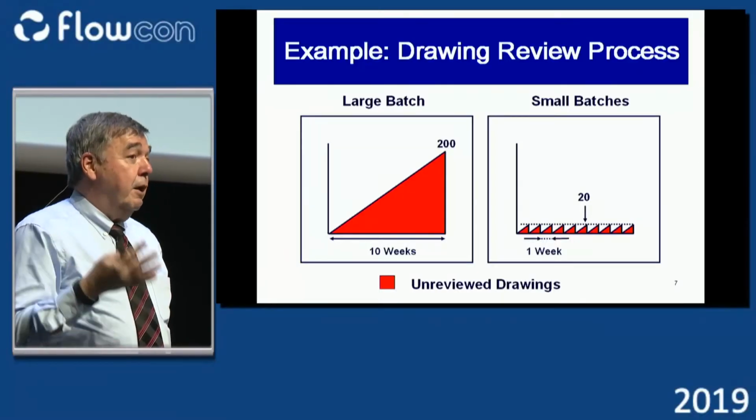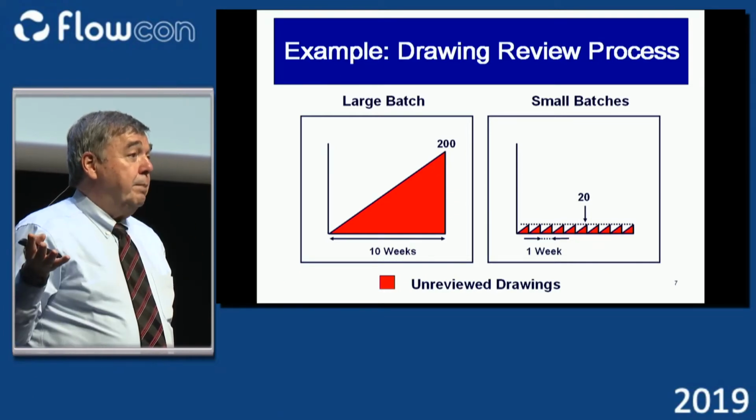And then we were smart enough to look at it and ask the question, is everything we're finding in system integration stuff that could only have been found when 100% of the equipment in the system was ready? And we discovered 75 to 80% of it is stuff that could have been found upstream, off the critical path of the program.